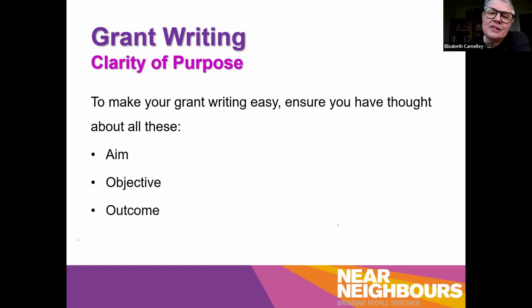The outcome, that is the change that you want to see happen. So an outcome would be young people have better mental health, more people have healthy activities, young people in Blackburn have more confidence, young people in Blackburn are more resilient. They're outcomes, they're changes that you want to see. And an output is something that you can count, like 50 people came through the project. I don't know, we made a video, that's an output.